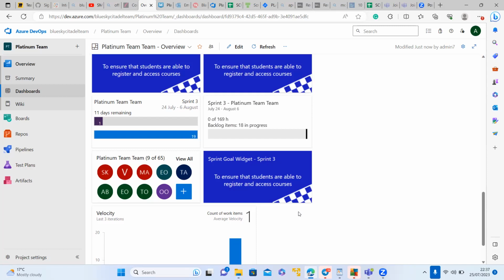You just leave them in the approved column, and advise that things are arranged in order of priority, the ones that are being moved back to the approved column, so that if the team finishes the 6 before the end of sprint, they can pick maybe the next top 2, which is priority, to work on, depending on where the team is during the sprint. But definitely, with the way you've worked in sprint 1 and sprint 2, with 12, you'll be surprised that you might end up spilling all or the majority of them.